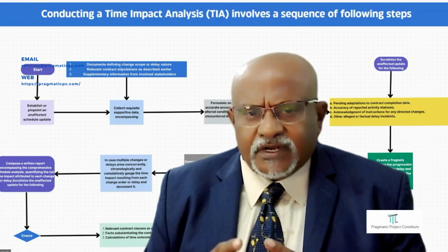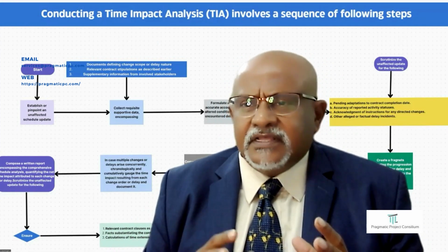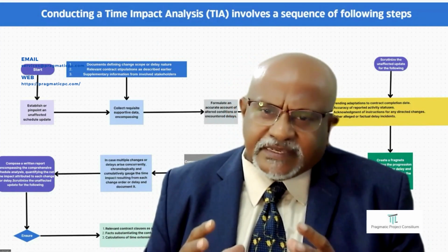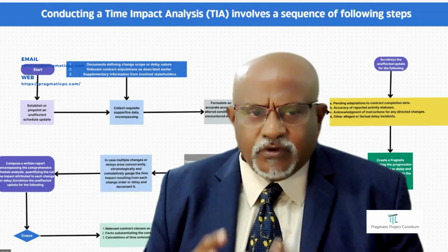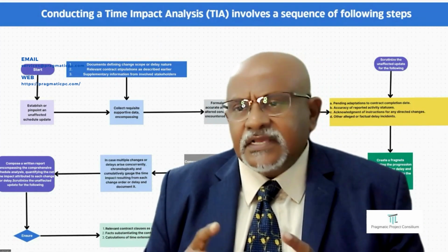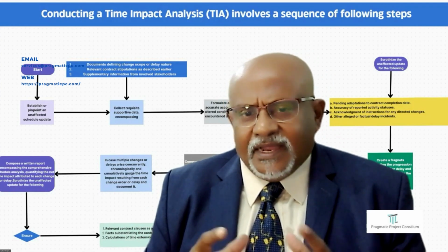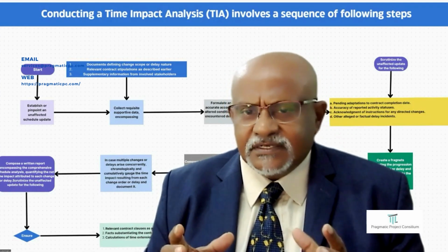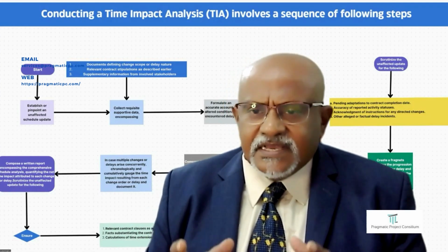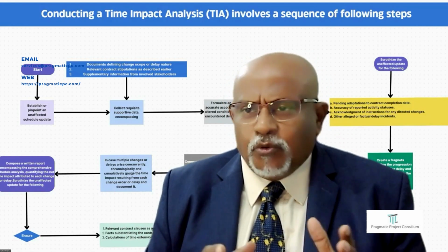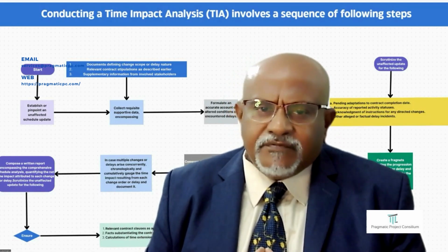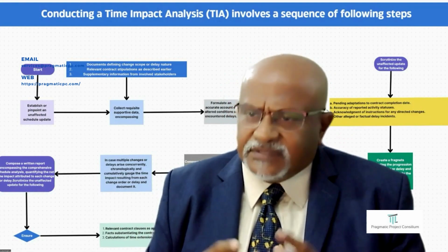If both the owner and the contractor delay, or there is any overlap, the contractor's entitlement to compensation for the owner's delay may come under scrutiny. The analysis should address this concern. Often this analysis necessitates expert opinions and should be informed by pertinent clauses within the contract.